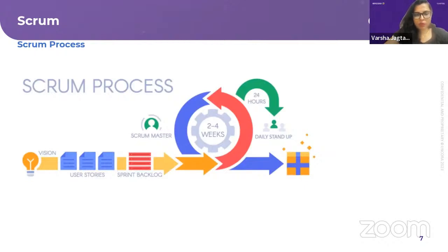After the sprint backlog, the Scrum Master's duty comes into the picture, and as I said, the sprint duration should be predefined. We might have a sprint duration of 2 or 4 weeks. So I would say this particular user story will be delivered in 2 to 4 weeks, and during these 4 weeks or 2 weeks, I'll have a daily stand up.